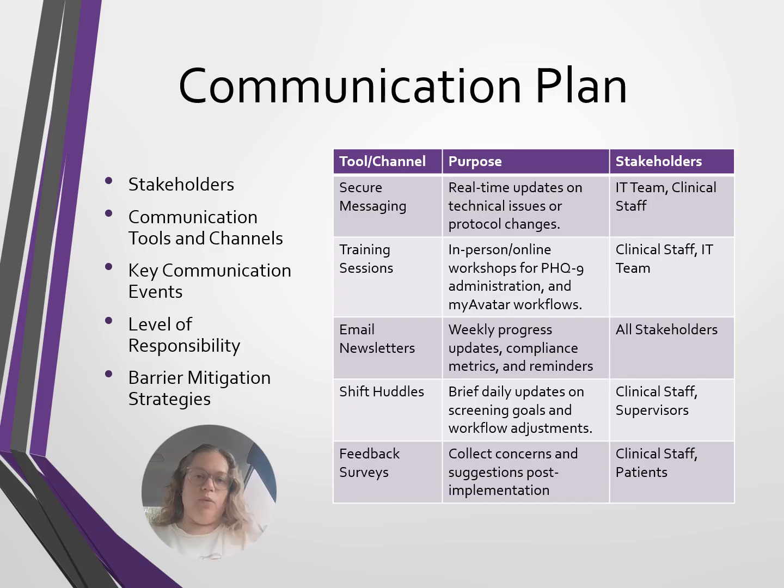Implementing the PHQ-9 tool in My Avatar requires a structured communication plan to ensure stakeholder alignment, minimize resistance, and support seamless integration. The stakeholders and their roles are as follows. Clinical staff: their role is to administer the PHQ-9 screenings, document results in My Avatar, and escalate positive screens. The information needed for clinical staff includes training on PHQ-9 administration, My Avatar workflows, and escalation protocols.